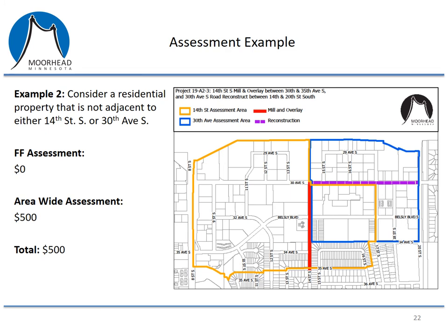For the last example, we'll consider a residential property that is not adjacent to either 14th Street South or 30th Avenue South — not within the project areas for either the mill and overlay or the reconstruction. For them, the only assessment they would receive would be an area-wide assessment of $500. They would not be receiving a front footage assessment because they're not adjacent to the work.